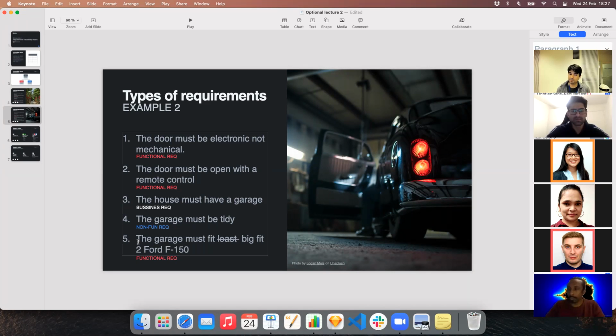But did we build a garage that is tidy? This is very ambiguous. Tidy in relation to what? We cannot measure tidiness unless we have more information. So we cannot measure that, and if we cannot measure it, then we cannot put it in the matrix. Easy peasy.